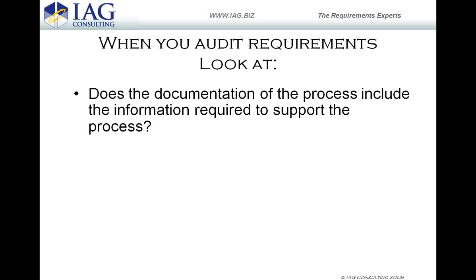And it's like this. If you ask how something works and you give a description, you might draw a series of bubbles on a page, a process flow diagram. And then you ask how does this one step work? And then you ask how does that one step of a step work? And then you ask how does that one step of a step of a step work? Increasingly what you'll hear is people describe information movement rather than process movement, okay? And so if it's not sufficiently detailed, it's very hard to do.